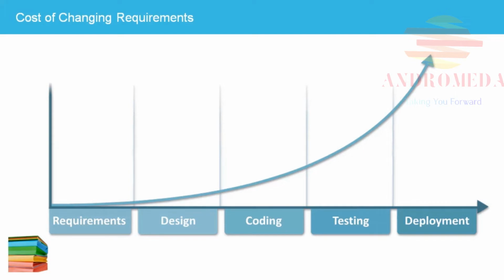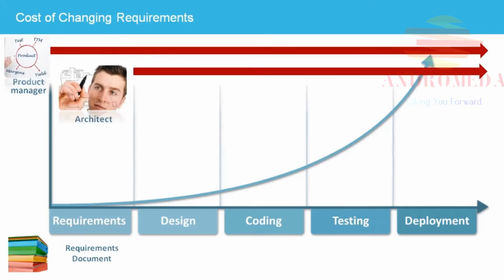Let's explore the rising cost of change to the requirements as the project moves through the SDLC phases. The product manager normally notices a defect in the requirements while interacting with the stakeholders. Stakeholders could be customers or high-level executives sponsoring the project. If a requirement change is found in analysis, it only involves the architect writing the requirements document. The architect will discuss the change with the product manager and update the requirements document before it is reviewed and accepted by the stakeholders.